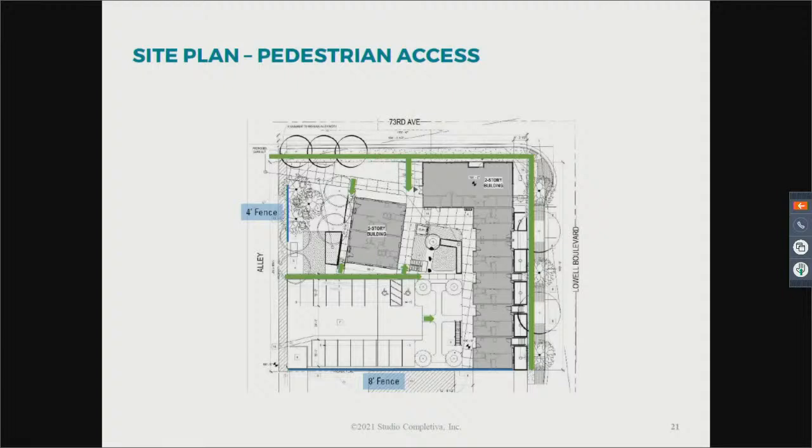As soon as they complete that work, the city will have the soils test performed. And if necessary, we will do soils remediation to make sure that the site is clean to the standard of our commitment to the Colorado Department of Public Health and Environment. We anticipate all of it being done probably by August. I think we're putting September on the sign to give us wiggle room because we continue to need wiggle room. Yes, this has been a wiggly project.